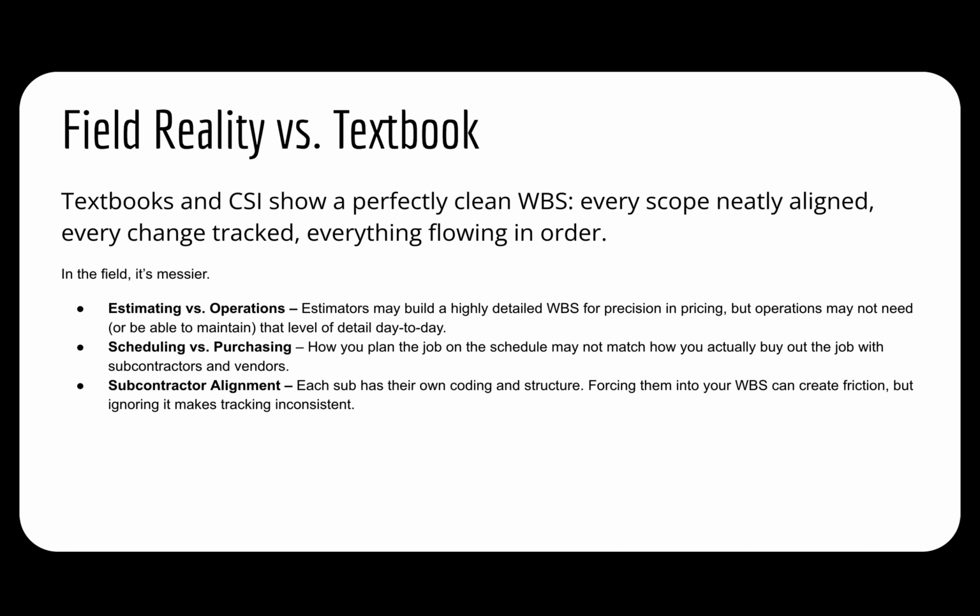Estimators may build a very highly detailed WBS structure. You may not need that level of detail on the day-to-day. How you plan the project, build it on a schedule, may not match how you're actually buying the job out. If you're a general contractor, you have your own WBS structure, but each subcontractor also has their own coding structure and how they're breaking down their project too.